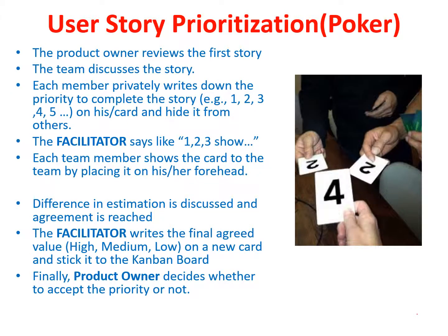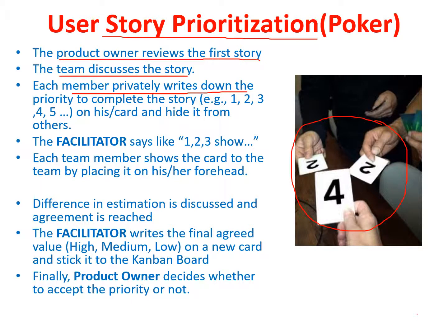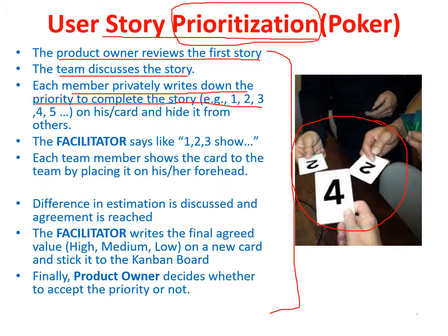Next is story prioritization. The process is the same: cards are hidden and the product owner reviews the first story, the team discusses it, and each member privately writes down a priority number. Priority can also come from the customer or product owner directly. If they haven't provided it, the team prioritizes in their own way.